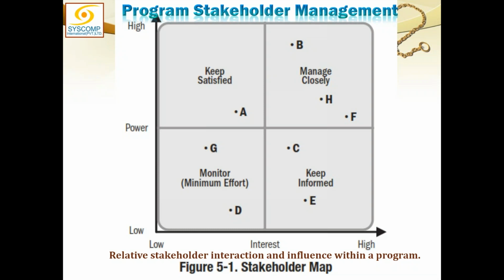But just because he provided me funding and he has high power, we also must understand he has low interest. He is not interested in your progress reports. He is not interested in the daily things happening in your program. So please don't bother him, because if you do, the banker is going to be angry with you, right?